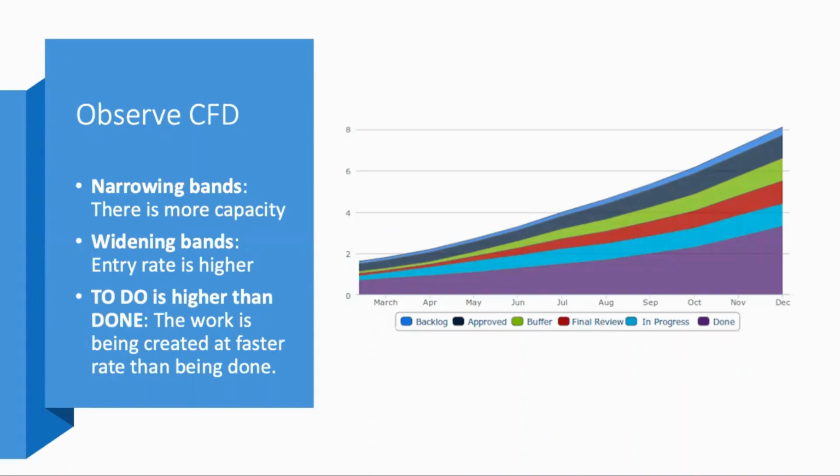When you identify your demand, you will identify what are the work item types that you are doing. What is the type of work? And then you try to classify them in the classes of service. And then accordingly act, so that you can have a smooth flow, a smooth band in the CFD. So the cumulative flow diagram is one of the metrics in Kanban that helps you assess whether your flow is smooth or whether you have to do something about it.